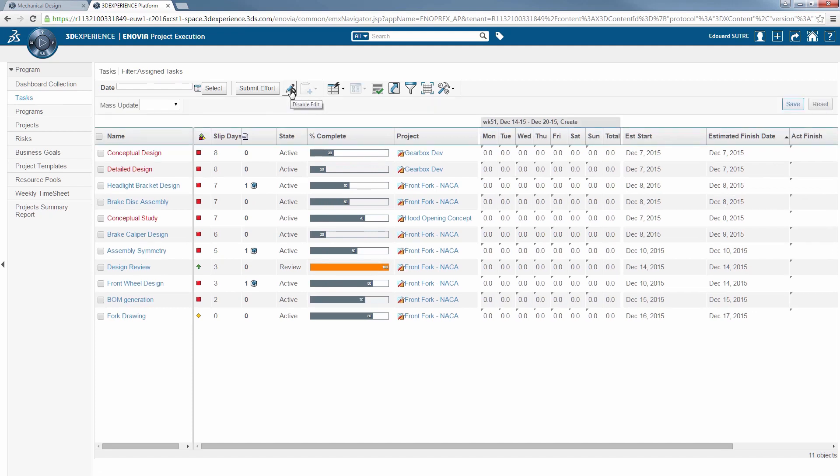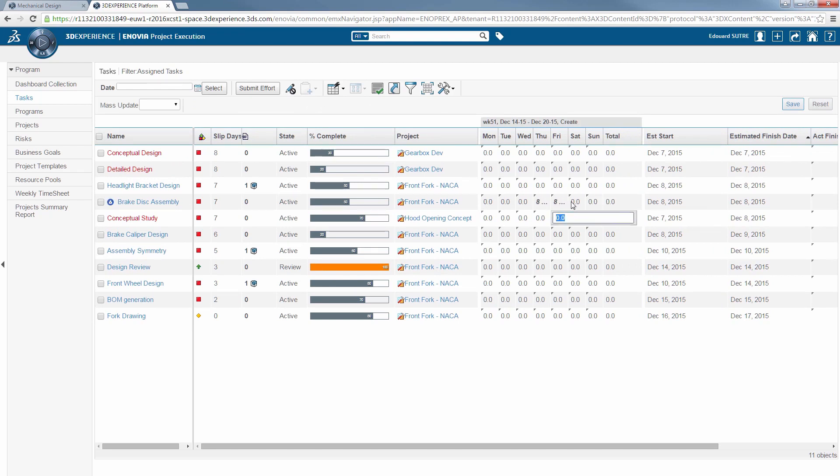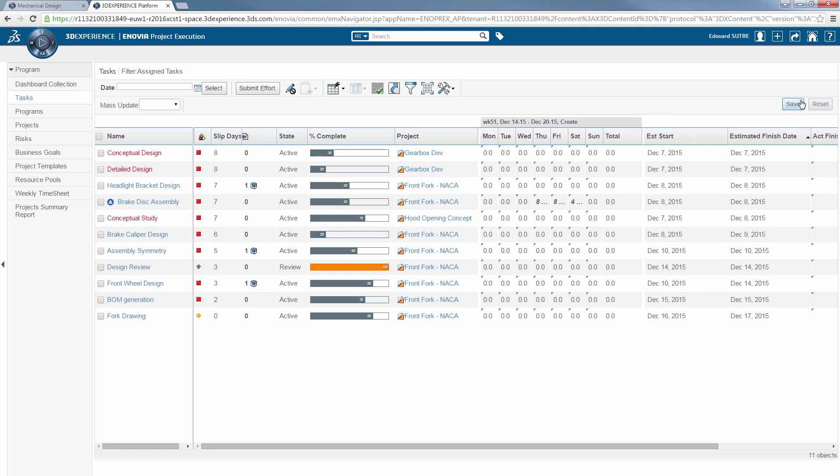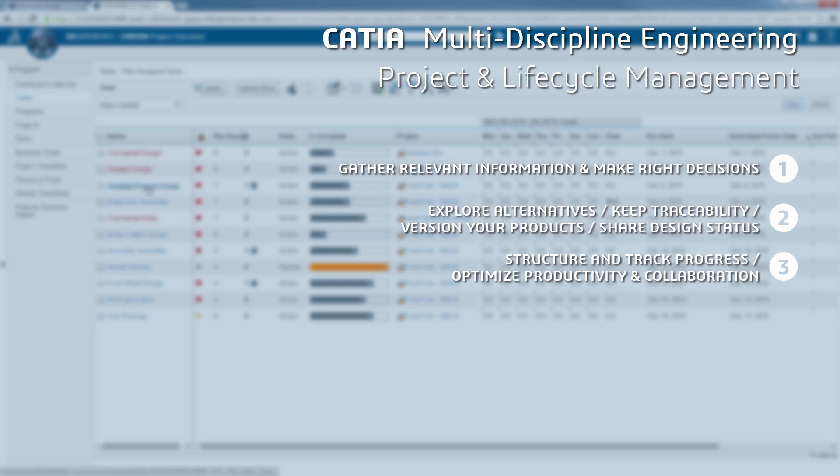The same app can be used to organize, plan your work week, and update the table of tasks with the time required to complete them. You can now submit your proposals to the project manager in order to plan and prioritize tasks, so you can structure and track your progress and optimize your productivity and collaboration.